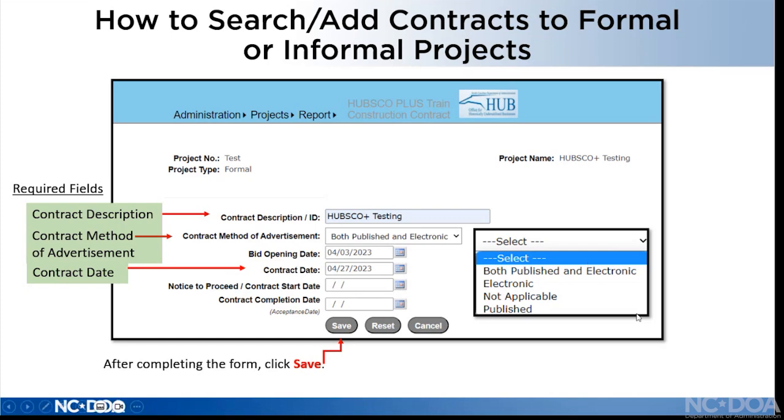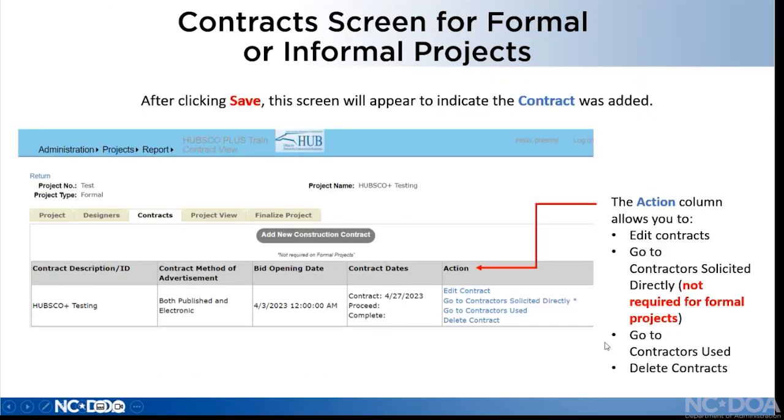And it's possible that you may be able to finalize some of the data if, like, at the very beginning, all your site work is done. You might want to go back and say, okay, the grading was done, the excavation was done, so I'm going to finalize the parts for that. But we've still got all this framing to do and concrete to pour and painting to do, electrical and everything like that.